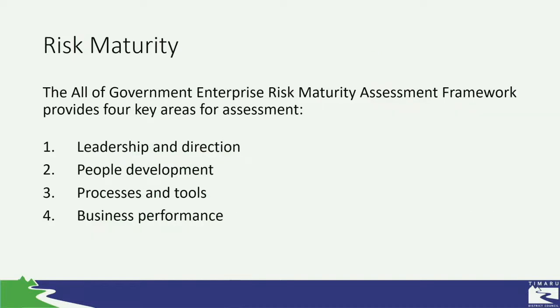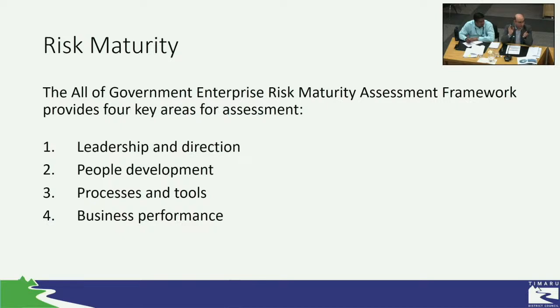So our current maturity is around 1 or 2. We need to go to 3 and 4. We approved the risk management improvement plan on 30 November last year. The improvement plan has 3 stages. Stage 1 is to get the policy. Stage 2 is to set up the tools. We have a ProMap system to capture the risk register, and training for everyone on risk management and how to implement it. Stage 3 is to start doing this. So we plan to have a quarterly meeting with everyone to review the risk register.